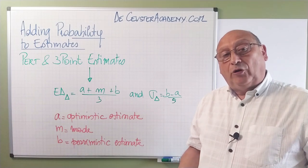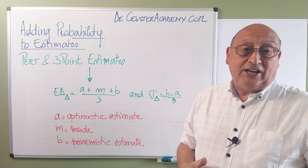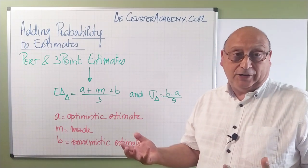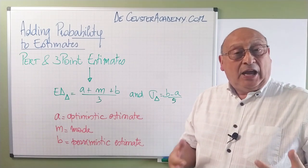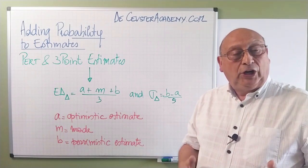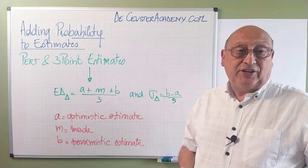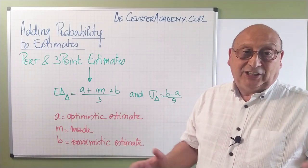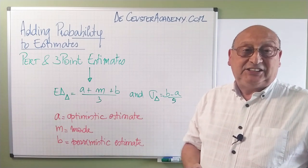Those two formulas will be very useful to add probabilistic estimation into our project duration estimate. The expected duration is a duration which has a 50% probability that the project is finishing in less than that duration or more. In combination with the standard deviation, we can find out, for example, what is the 80% probability, or even more — we can say we want to be 90% sure, and calculate the corresponding duration depending on the average and the number of standard deviations to the right of the normal distribution.